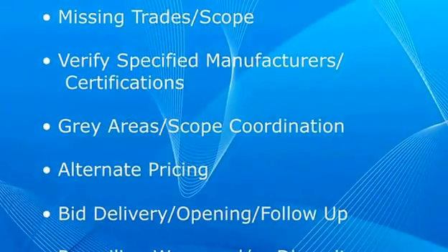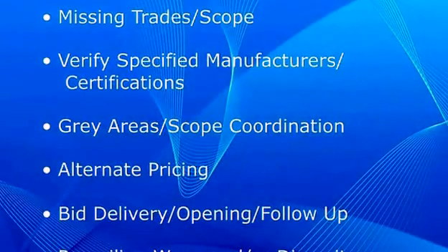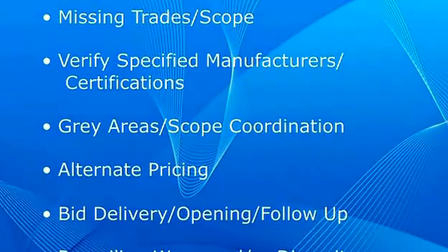The last item, prevailing wage or diversity requirements. On estimates, a lot of times, and it's become more prevalent, you have to list your EDGE participation, or possibly MBEs, FBEs, WEs, DEs. You need to be able to list those things. And so leading up to the bid, you need to get a good idea which contractors are bidding you, subcontractors, which ones meet those requirements. How are you going to fulfill that requirement of the bid?